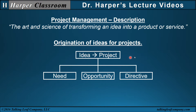The origination of ideas for projects can indicate the importance of the project and determine how the project is to be conducted. For example, if it's a need, the quality of the project deliverable could be important to ensure it satisfies the need. If it's an opportunity, the process can be as important as the deliverable in order to learn as much as possible and enhance organizational assets. Or, if it's a directive, obtaining the deliverable as quickly and efficiently as possible could be indicated.